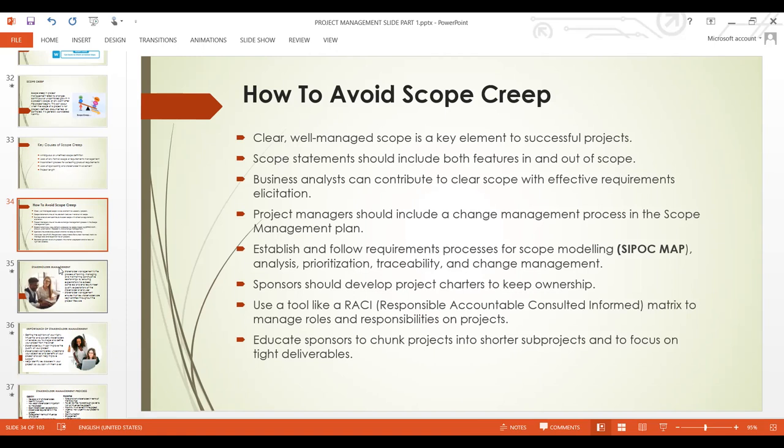And who must be informed? You need to inform all the stakeholders, every party that should know about this activity you are doing, or your deliverable, or that particular scope. If it's a document, very soon we'll start using a management tool like Basecamp, where we manage projects. In Basecamp, when you upload any document, there are some people that must see that document, and you give them access to see it. When you give somebody access, the person is informed. They might not make any input in that particular deliverable or document, but they have access to it. So that equally means informed.